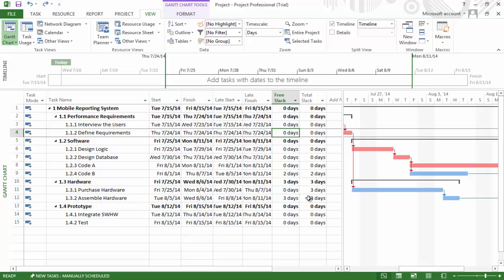Overall, if we take into account the amount of slack compared to the estimated duration for non-critical activities, and the fact that there is only one critical path, we could say that this project is not that sensitive.